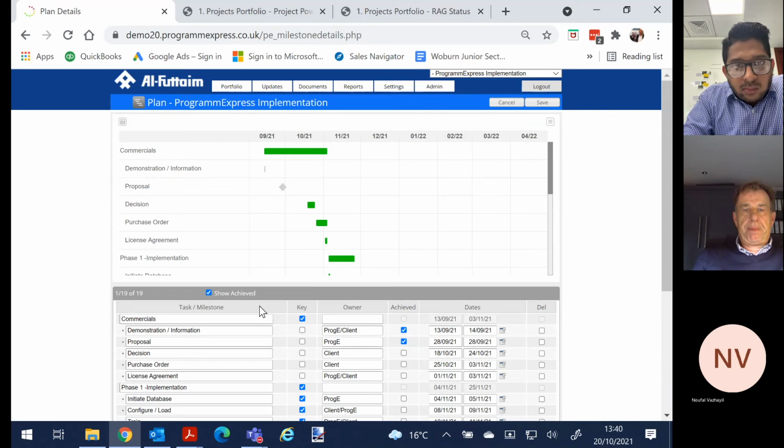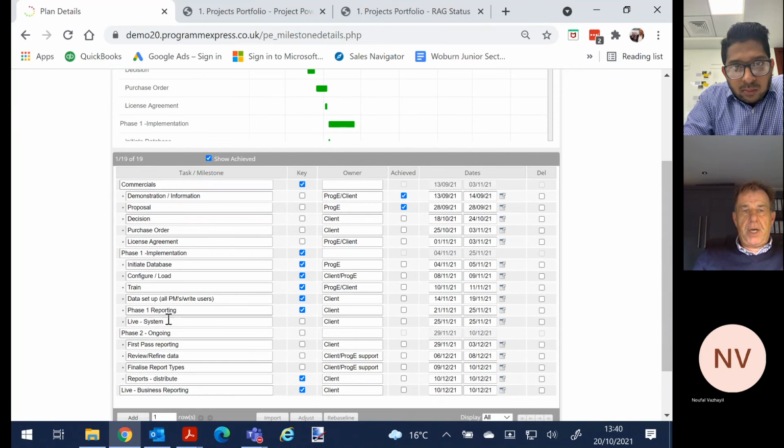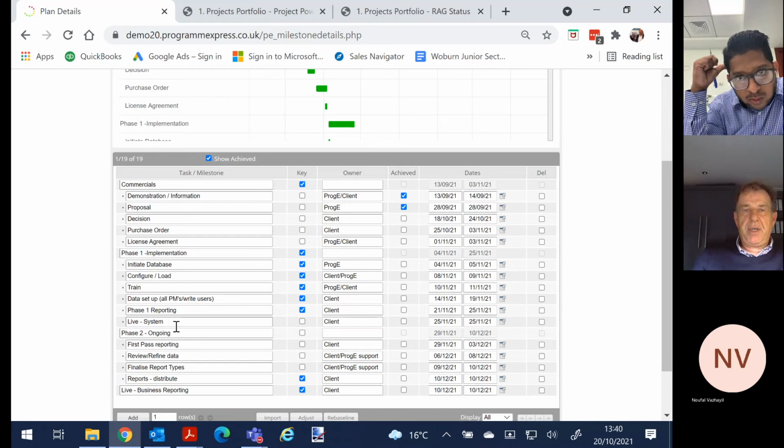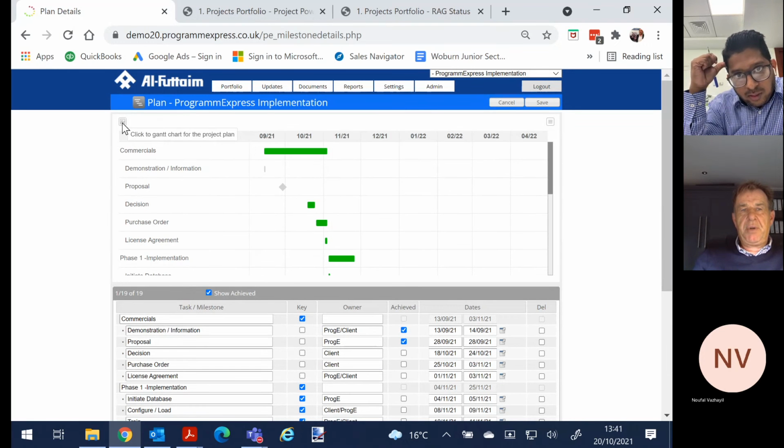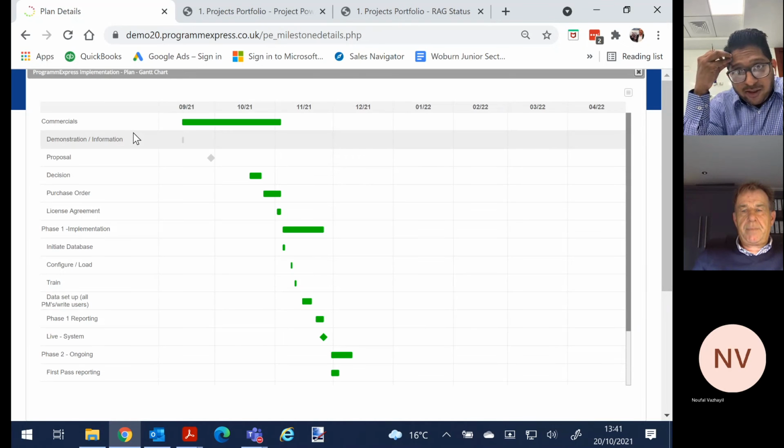what I put in here is the data of the actual plan, which goes down to 2 levels. And we don't necessarily subscribe to that. We say that over a lot of projects, you should maybe have your 7 or 8 key milestones across every project, and let people use Microsoft Project if they really want to use Microsoft Project or that type of solution, and it shows you a picture. At the moment it's more or less an Excel-based project plan, I would say, rather than MS Project.